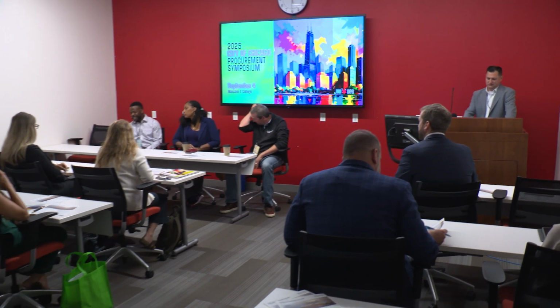All right. What do you think are the main differences between a design bid build and a CMAR procurement? I'll take that one. I think the biggest benefit that we can offer our client with the CMAR delivery method is constructability, schedule, and cost input through each phase of design. I think at the end of that process, ultimately everyone is fortunate to have a more constructible and lean design. So the client, when this works well, gets value, typically speed, and quality.